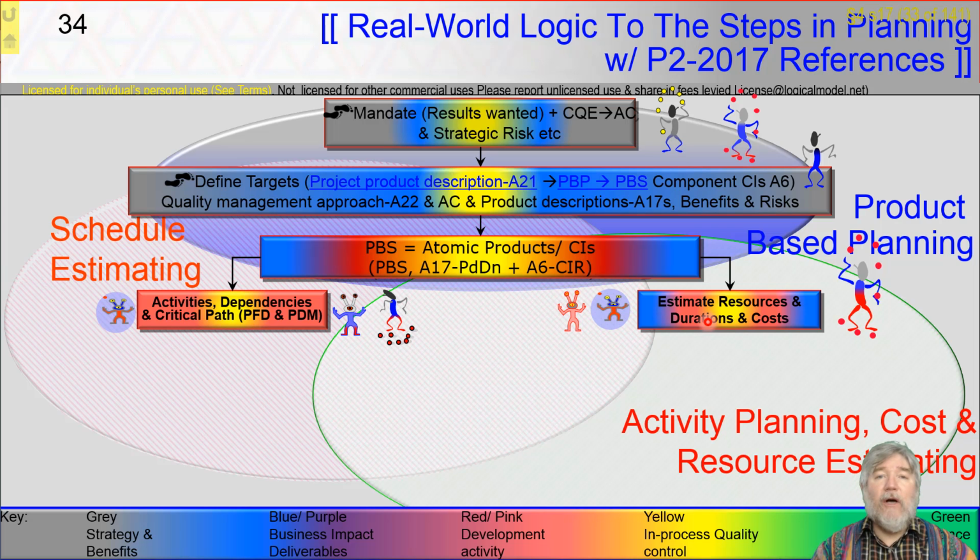Now in Agile terms, we say we'll estimate the work to be done in a unit that has no correlation to either the calendar or anything else, and then we'll start doing some work and we'll be able to benchmark the size of our unit to how long it takes us as a team to deliver, and that way empirically we can evolve a reliable rate of progress, which we'll call velocity.